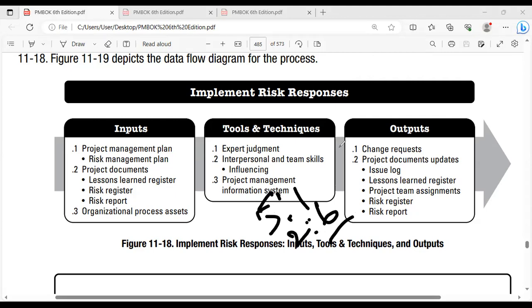For a particular risk event, for example, you will not get your rooms to run your meetings. It is completely occupied during the month of December because of the continuous training listed at the beginning of this year by HR. The other department will be occupying the complete room, so you don't have any room or facility to run your strategic meetings or any meetings. So you need to hire a facility. You want to build the facility, or you want to go with the rent, or you want to go with the lease. So you will be doing the cost-benefit analysis.